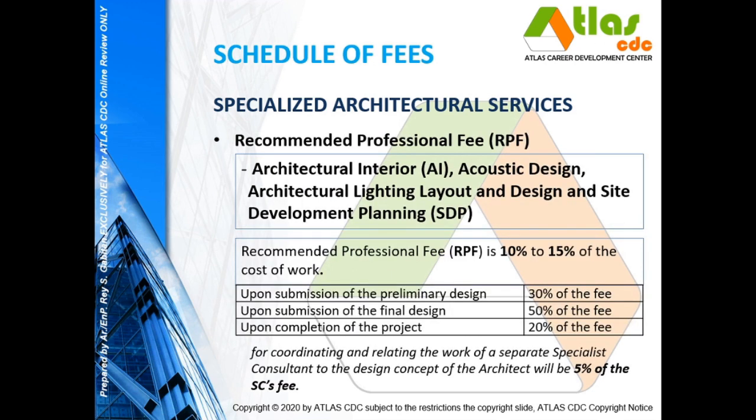Now, for architectural interiors, acoustic design, architectural lighting, layout and design, and site development planning, the recommended professional fee for specialized architectural services will be at 10% to 15% of the cost of the work. So take note here, the percentage is based on the cost of the work, not the percentage of the project construction cost.